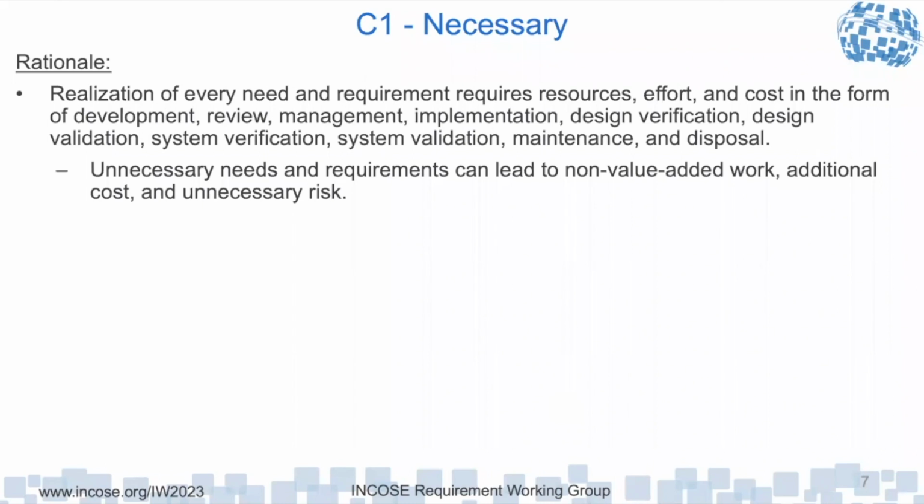So, for example, if you were to tender with some latitude, then you might use your attributes to say, for example, that the system shall do something: 100 essential, 110 desirable, and 120 highly desirable, or provide some function or graph as to how the customer values that particular requirement.